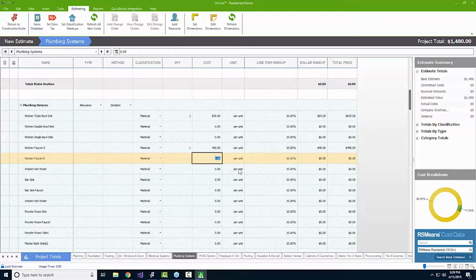So they just put in their cost as being more. So they just upped that number. And they actually had a couple of categories where things were going to be lower. And in those, they were actually underbidding to make up for the fact that they had put a higher markup than that category needed. So it was a little confusing to get to the right number, and it made it almost impossible to track the budget or the actual job cost with any sort of accuracy, because at that point those numbers really don't mean as much.